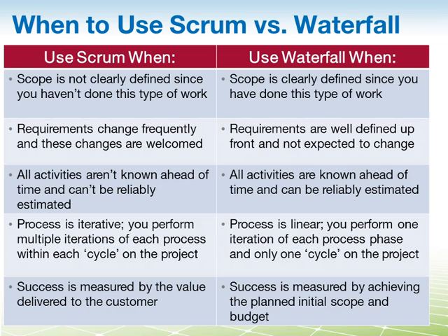So generally speaking, Scrum is a better method to be used on more complex projects, and also for those projects where it is difficult to define specific requirements and estimates at the beginning of the project. If the project is not very complex and you know the specific requirements up front and you can provide accurate estimates, well, you are probably better off using the Waterfall method for your project.